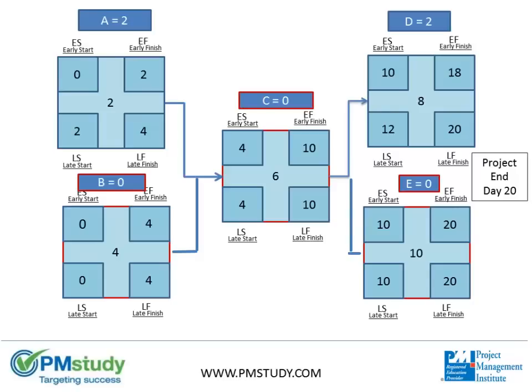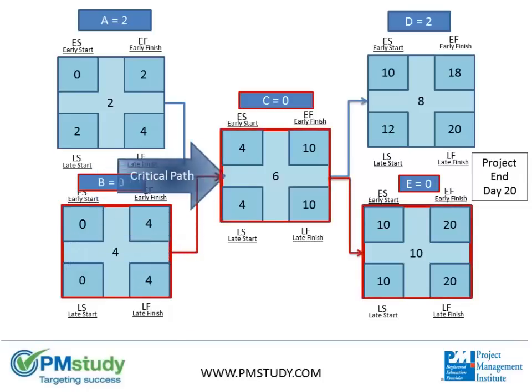So out of the four paths in this diagram, there is one critical path, which is task B to task C to task E.